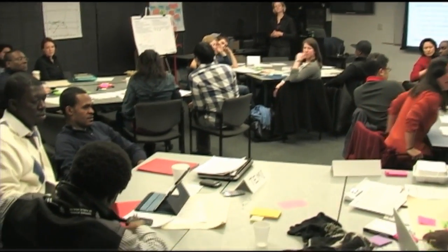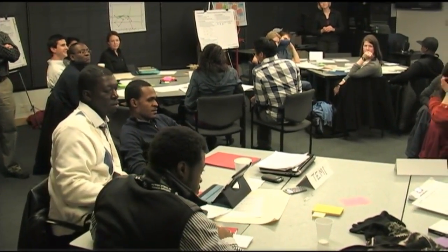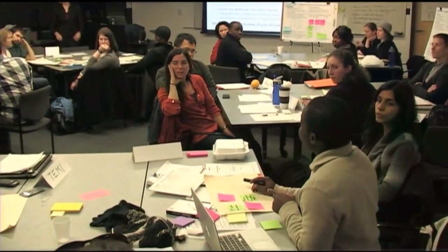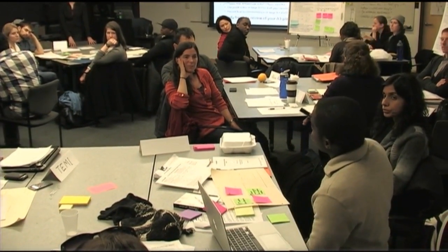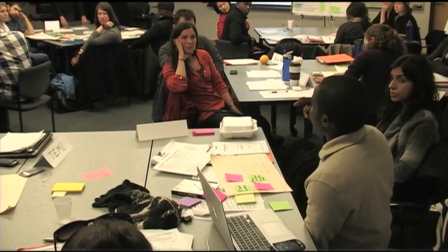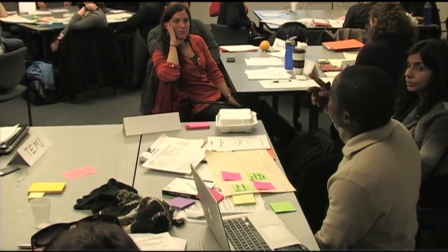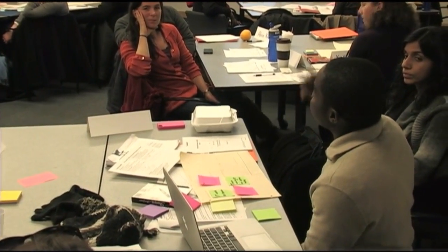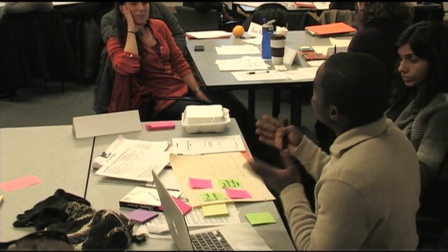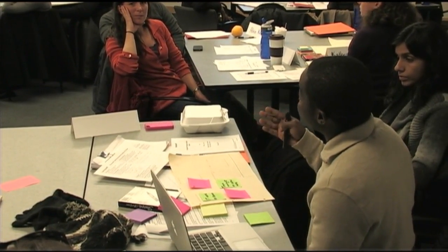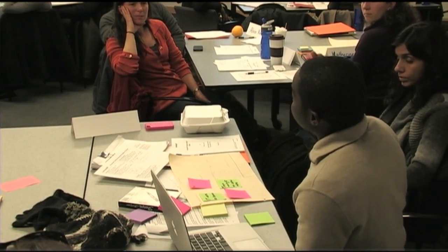Let's go around to the next table. Okay, so we'll try to introduce a vendor pilot for our suppliers to add the XXX on the PFR. We would start with a pilot model, maybe one or two suppliers, and then scale up depending on the success, or introduce some modifications as need be before we expand for the PFR.